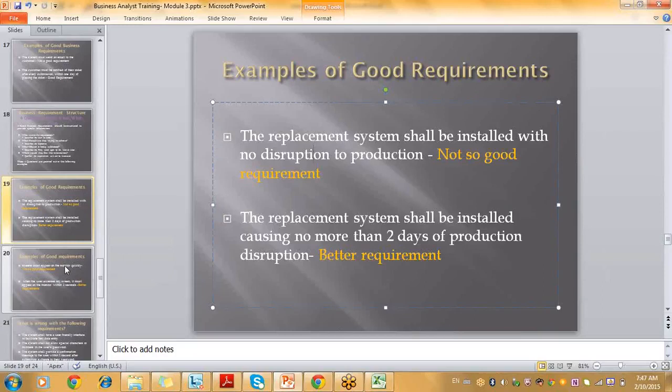No, see, basically for everything, whenever you are going for a project, whenever your project manager schedules the things, for everything we keep 1 or 2 days, or based on the requirement or the project, we keep a buffer time for each and every phase. Why do you keep that? Because you don't know where you might hang up in something. If suddenly your infrastructure goes down, you lose time, right? So for everything we keep 1 week or 2 to 3 days buffer for each and every phase, starting from the planning till deployment. All right.